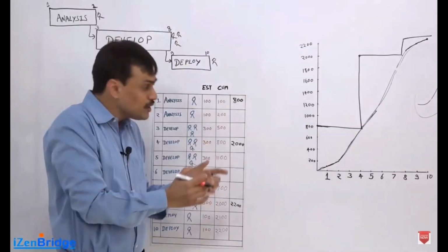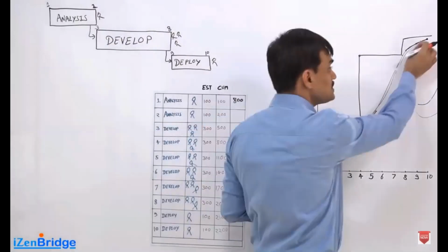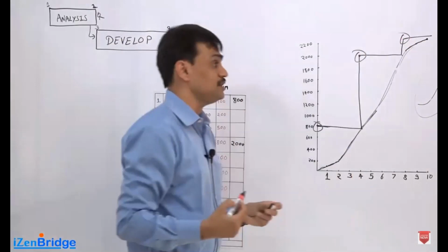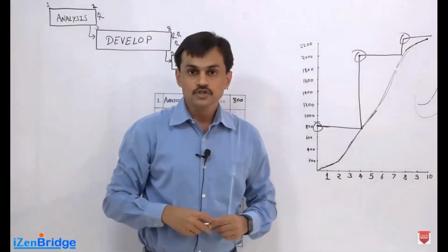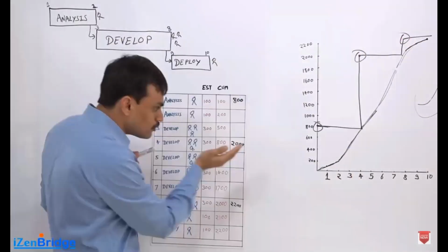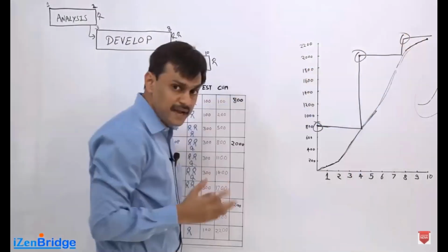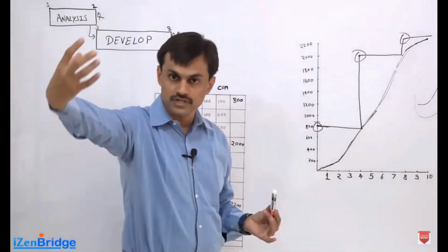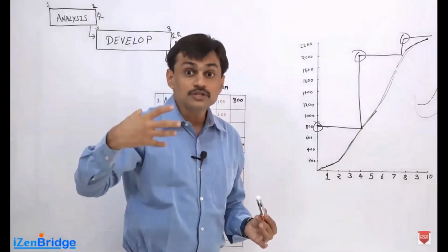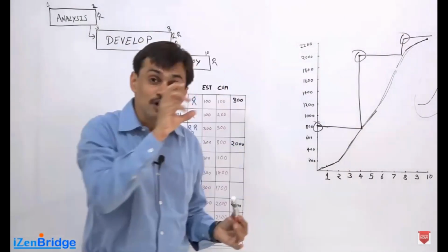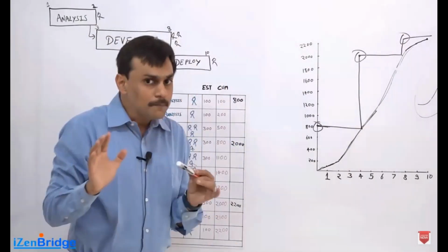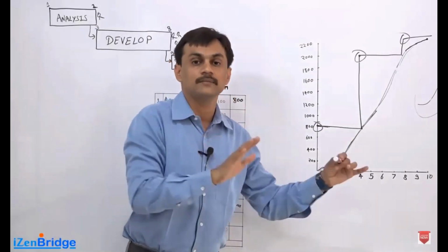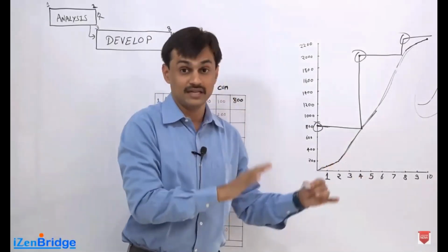So your expense is happening on a daily basis, but the request of money inflow is happening on a periodic or milestone basis. So when you are determining budget, it is not only about figuring out how you are going to spend your money, or how you are estimating to spend your money overall for your project work. You also need to figure out how the money is going to come to you, and how you should balance the incoming money and outgoing money